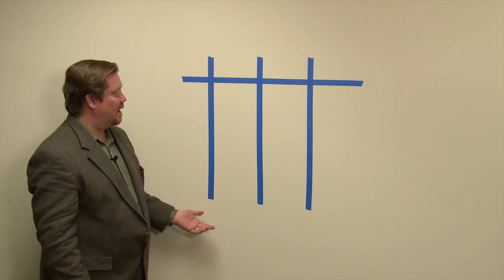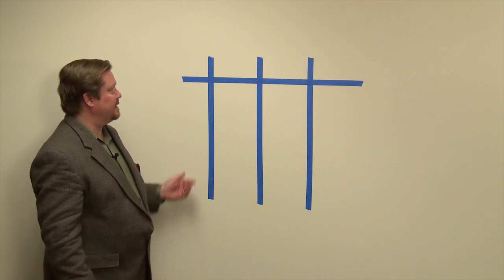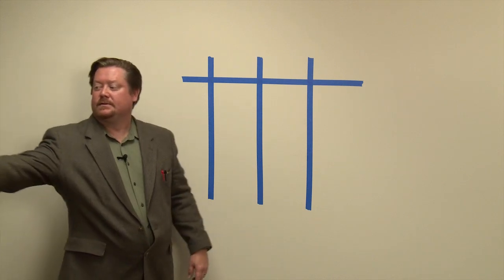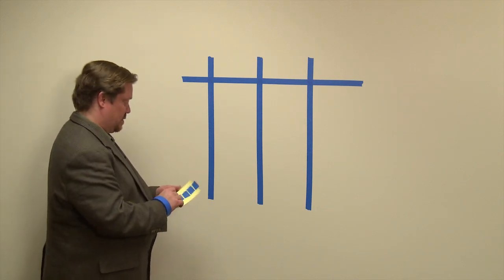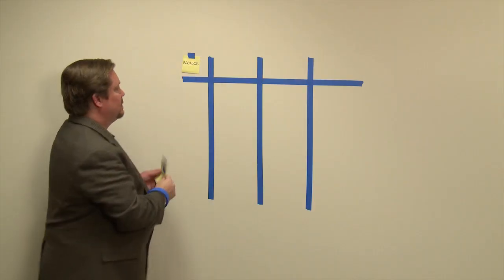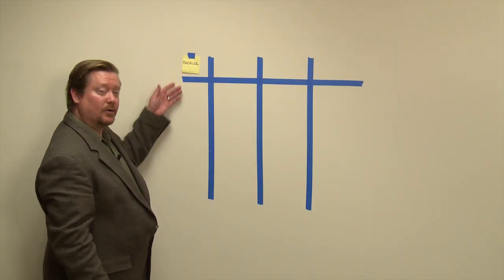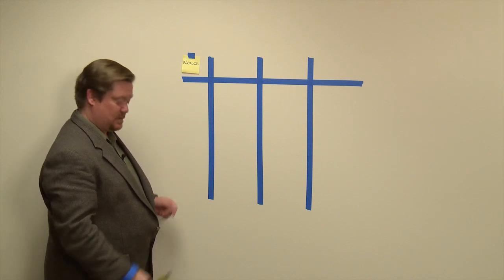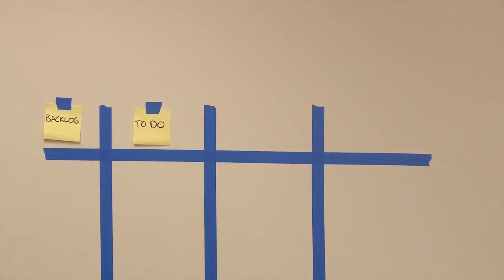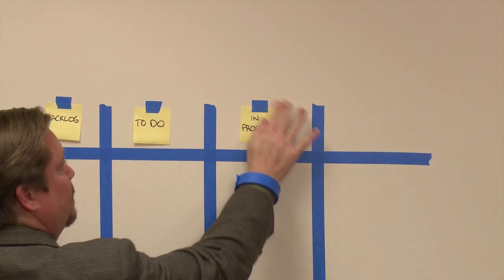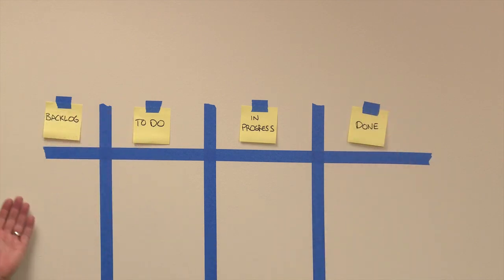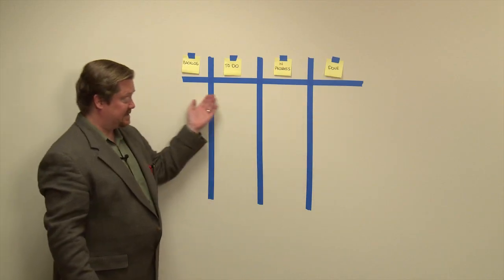Now you've created your first Kanban board and you need to label each of the column states. The first column is your backlog — this is your master backlog for the project. Highest priority items go high and lower priority items go low. Next column is the to-do column, then the in-progress column, and then the done column. This is the simplest Kanban board to implement — it shows each of the statuses.